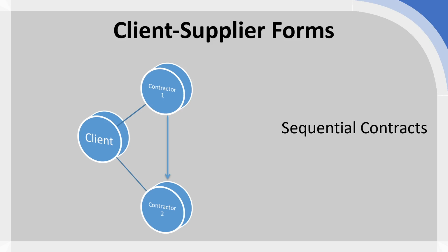contractor responsible for the design documents to actually design the place itself, and then they need to hand over and coordinate, or at least interact with the second contractor, which may be actually carrying out the work involved. So not only do these have to run in a particular sequence, there is a degree of interaction, and deliverables that need to move from one contractor to another contractor, and it is the client or the procurer who ultimately is still going to be coordinating and overseeing the process as a whole.